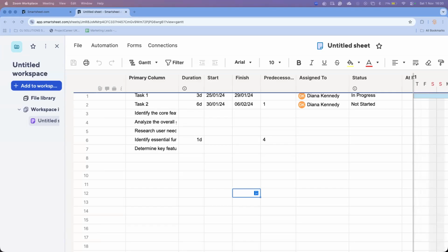The risks and issues. So the first risk that we have is lack of weekend deployment access affecting rollout, meaning that rollout is just delayed because we don't have enough access. The action we're taking is to engage with the hospital operations to secure dedicated access windows. So we are asking the hospital system if we can have specialized access windows so that we can roll out the project as quickly as possible.